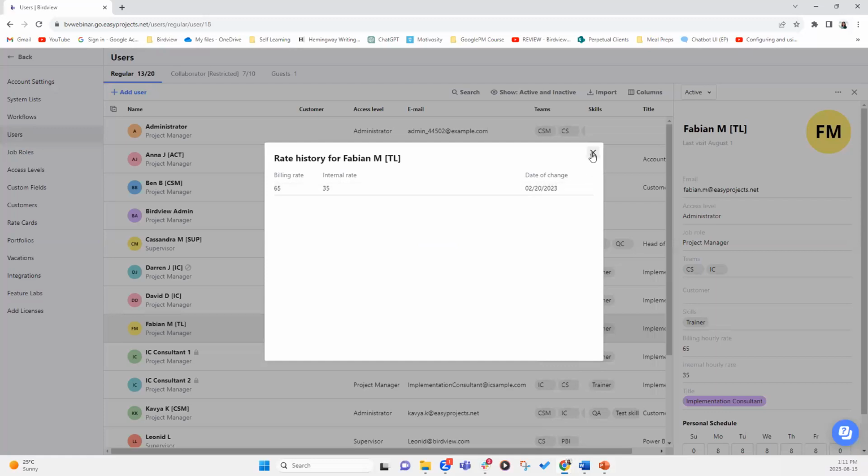So if I was to change their date, the system will take the hourly rate that's changed on a specific date. User hourly rate cannot be predated. It takes effect as on the day it has been changed.